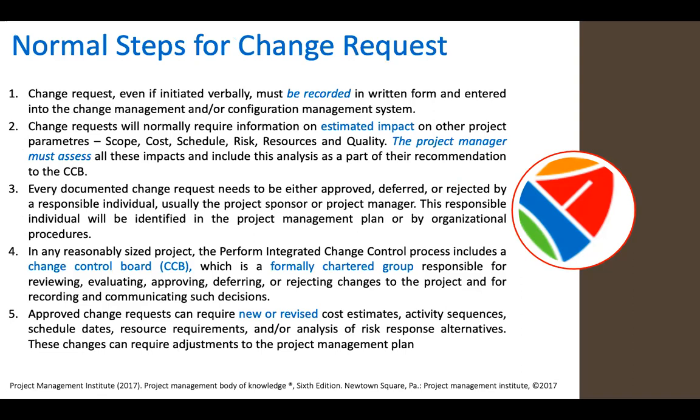All right, so what are the normal steps? It can vary from company to company, but these are the normal steps that we usually follow. A change request, even if it is initiated verbally, must be recorded in written form and entered into the change management or configuration management system. A change request will normally require information on estimated impact on other project parameters like scope, cost, schedule, risk, resources, and quality.